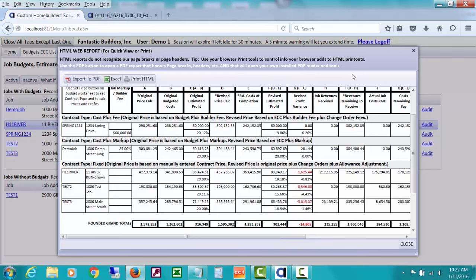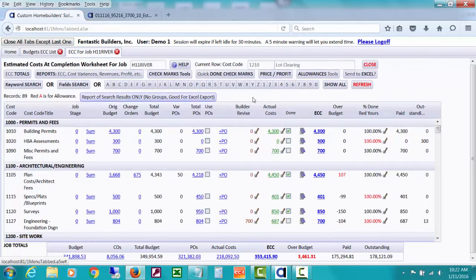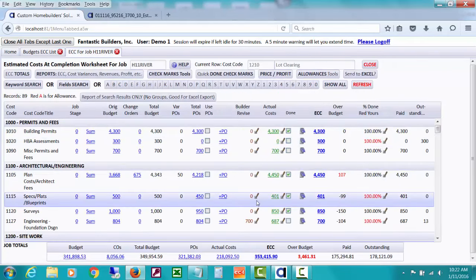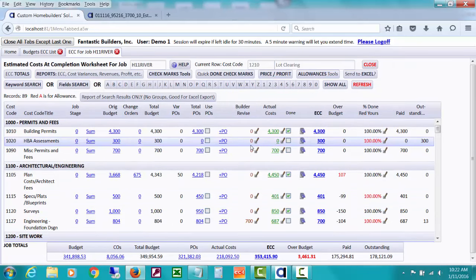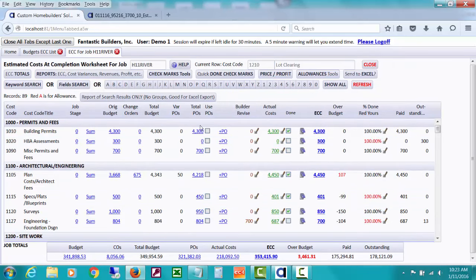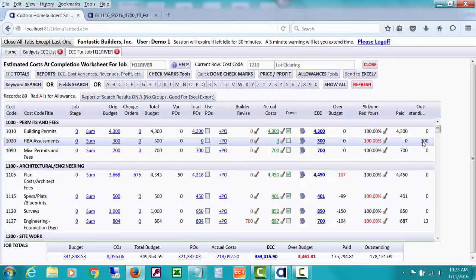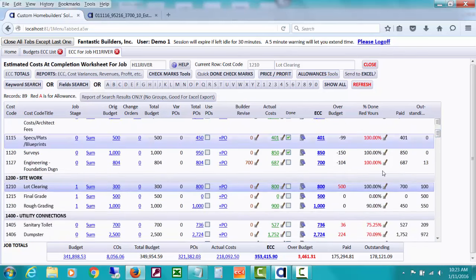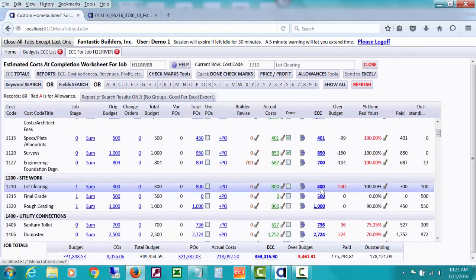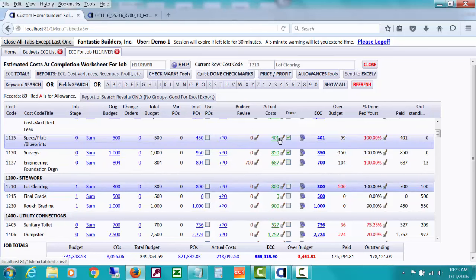So you can get some good ideas of where you're at cash-wise and profit-wise and really analyze all of your open jobs, which is very important for a professional home builder to do. And this is using the estimated costs at completion to get a revised estimated profit and a profit variance. So it's very important that the builder puts hands on that estimated cost at completion worksheet, does the scribbles as needed. If the builder knows something different, looks at the POs, can spot things that might have been posted to a wrong cost code like this one, bring that to the attention of the person that can make the change or do it themselves. Whoever's on this screen by doing some drill down that I'll show in another video.